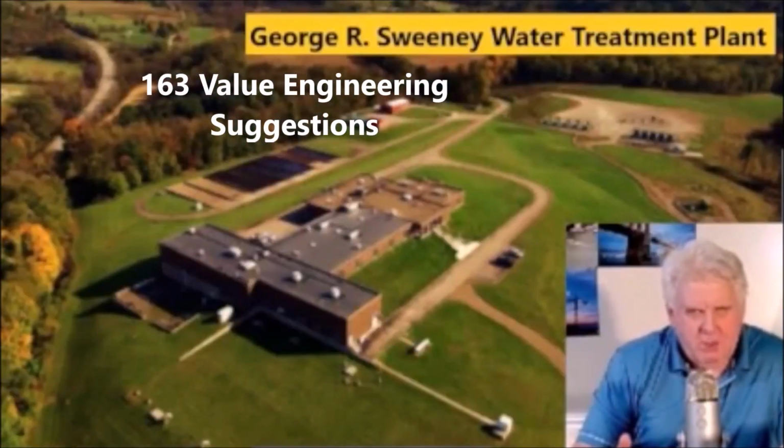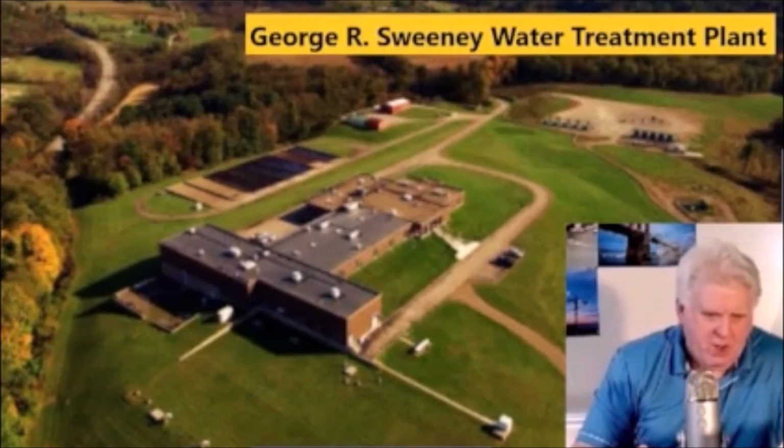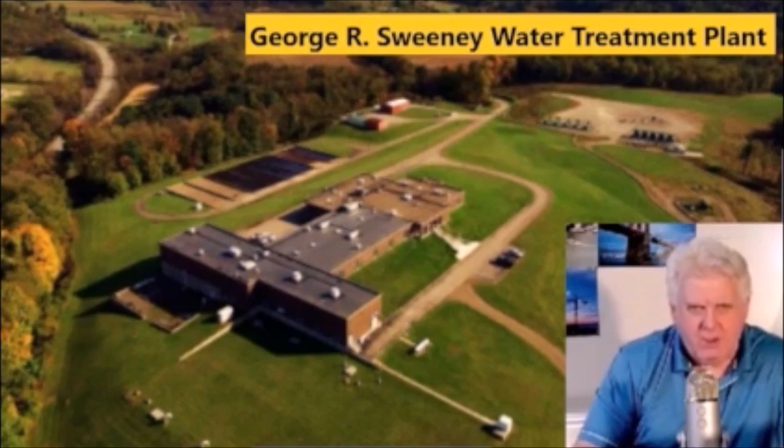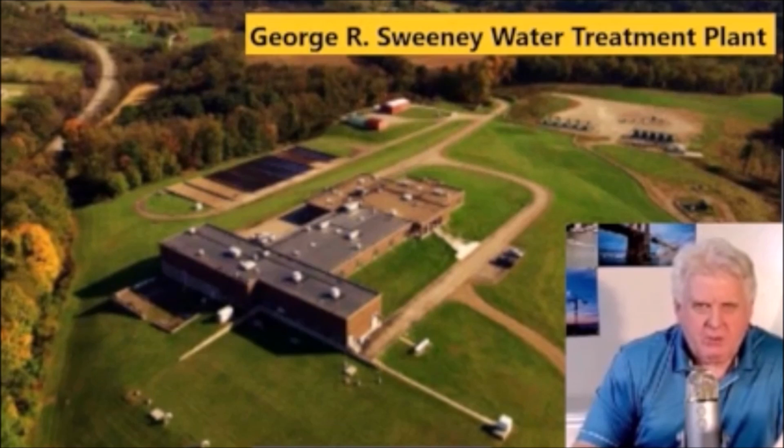After the bids were received, the project cost was around $26 million, and the value engineering alternates produced a savings of around $1.5 million. So we again met with the owner and the engineer of record and the value engineers, and we reviewed each value engineering item and its savings, and they ultimately accepted around $1 million in reduced costs. Thus, we were able to meet their budget of $25 million for the construction of this water treatment plant.